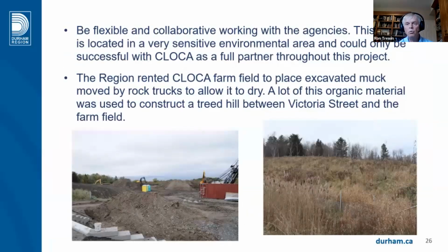To give you an example, working with CLOCA to dry out the excavated muck was very positive. They basically rented us a part of their farm, which I had shown on the overall picture. This allowed us to reduce costs and use rock trucks to this area so that it could be dried. So we didn't have to take the excess material away, sloshing, especially through the winter months